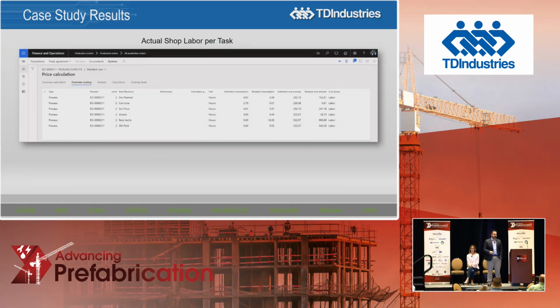Now, this is our actuals. This is after that package went through the shop floor, how many hours were logged against that package, how much material was actually used. You won't be able to see it from where you're sitting, but there is a projected labor also on here of how many hours it was projected that this package should spend in the decoiler station, and how many hours it should spend in the assembly station if it goes to the assembly station, okay? So then we have projected hours, we have actual hours. Now we can do comparisons from our projections to our actuals and start to dial that in. And eventually our projections become significantly more accurate.